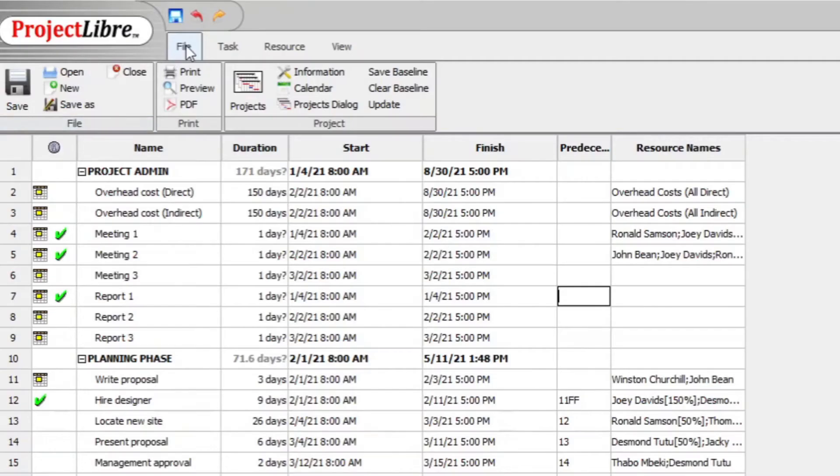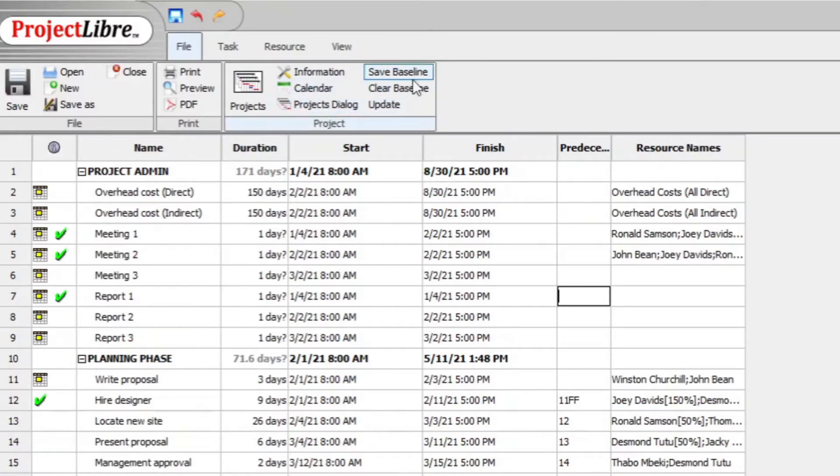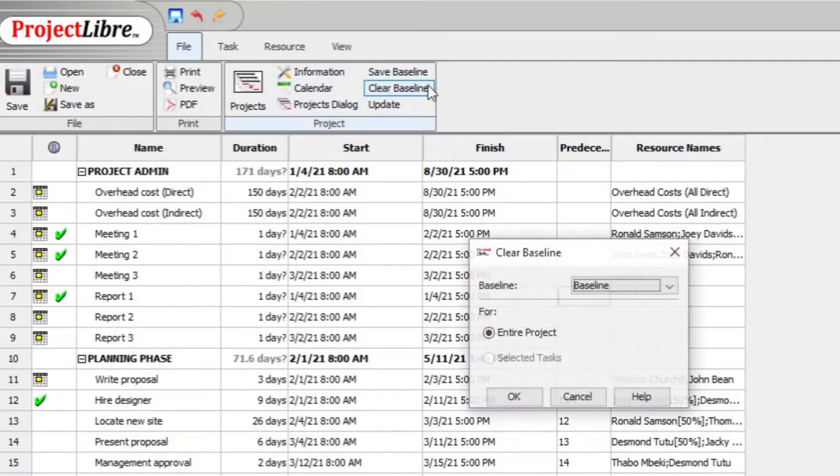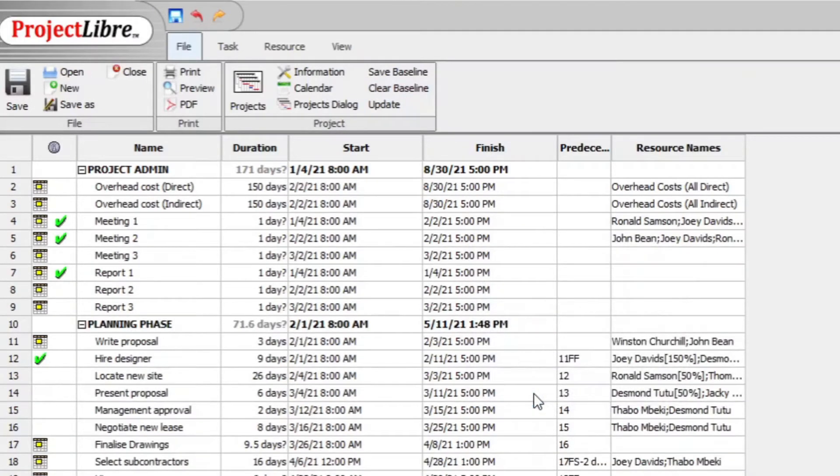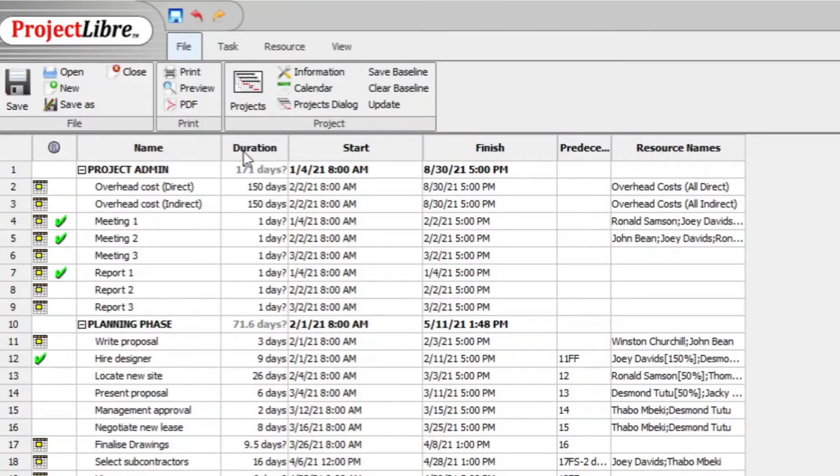Go then to the file tab and on the file tab here on the project, clear the baseline of the entire project because you are interested in the project and do it somewhere at the start because it is possible that you can forget to clear the baseline and then everything that you do is futile.